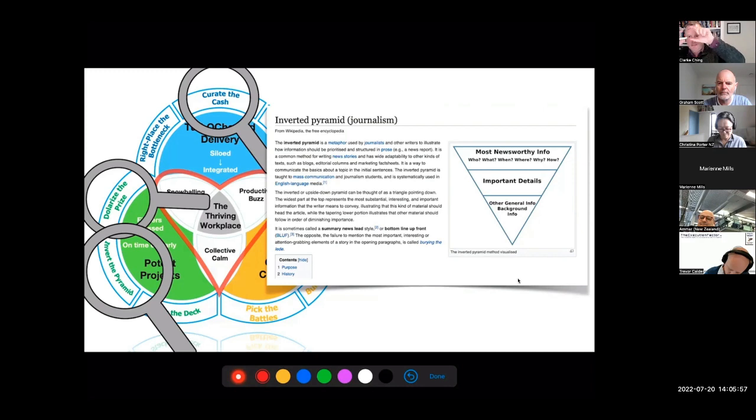is they write the lead paragraph. This is one of the cleverest ideas, and this is how to do agile projects 101. You write the lead paragraph, and that effectively becomes what your espresso is. And the lead is, if you read that top paragraph, you go, I don't need to read any more unless you're really interested. And then they have the important details, just like on the screen here. And then they add other stuff below. And that gives huge flexibility